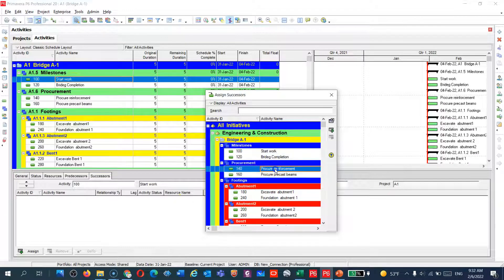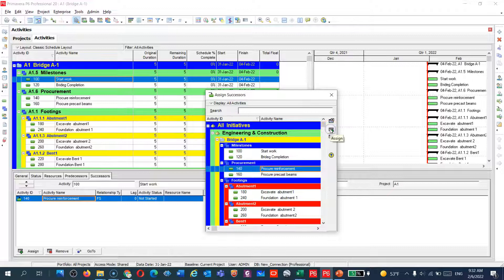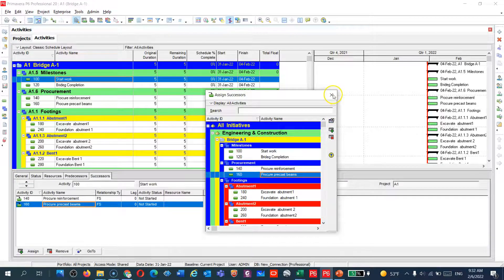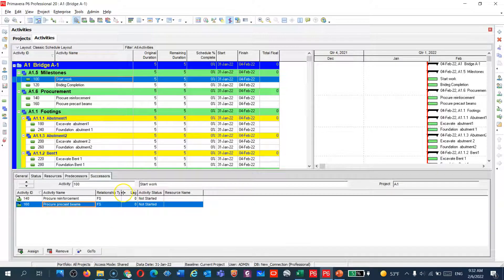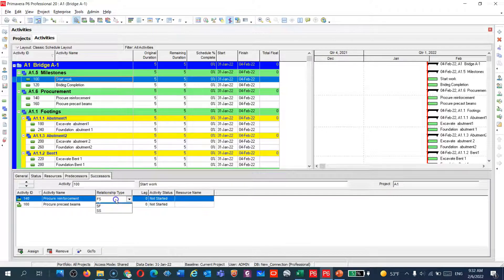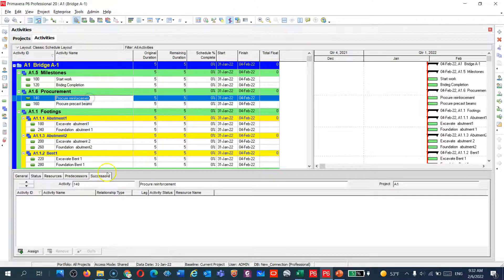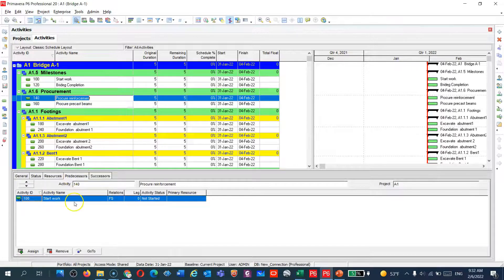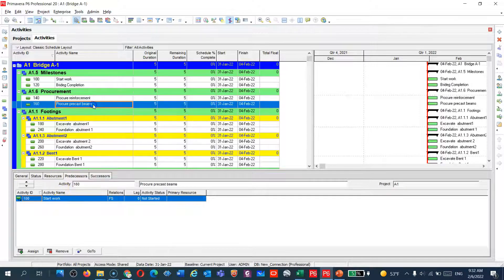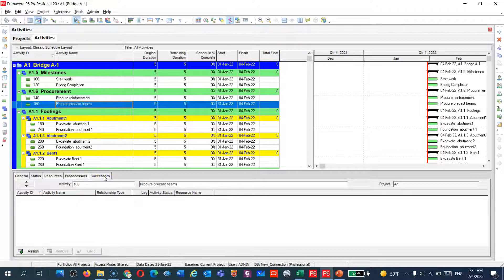After 'Start Work' I need to start procurement and also procurement for beams. The program defaults to finish to start, but you can change it to start to start or whatever suits your needs. If I go to procurement I will see the predecessor is 'Start Work.' For precast beam, the predecessor is also 'Start Work' and the successor is still empty.